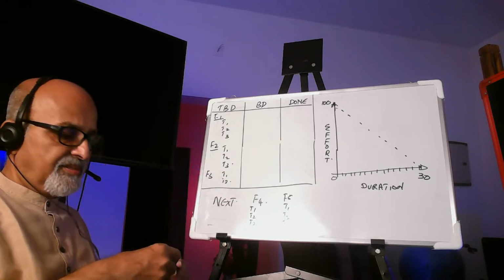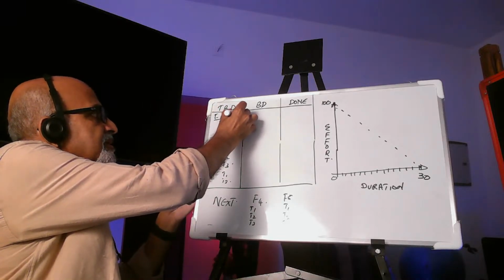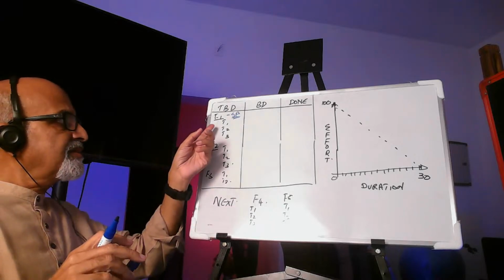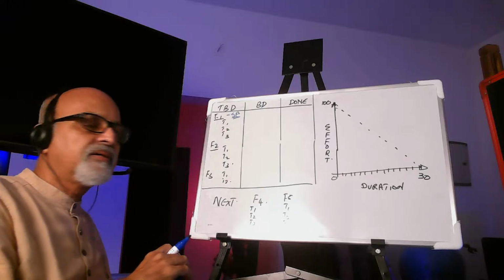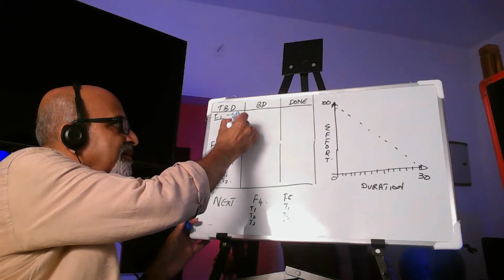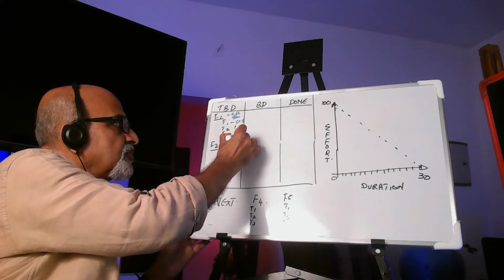Against the features, we'll have the story point. We discussed the Fibonacci series and all those things. Against the task, we have effort like 0.5 day, 1 day, 2 days.